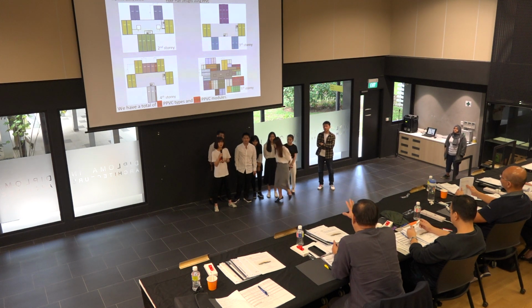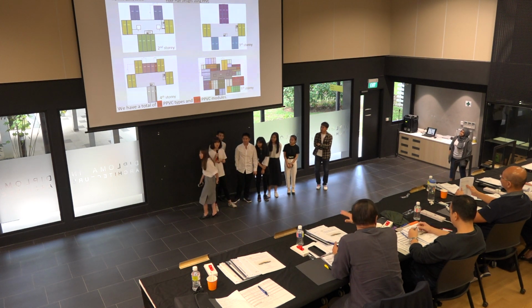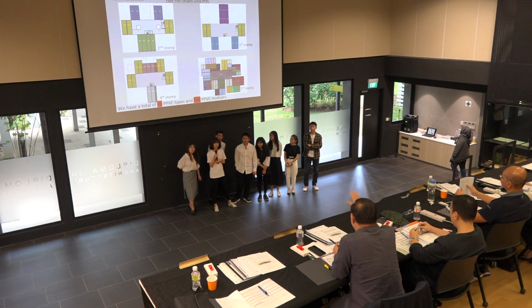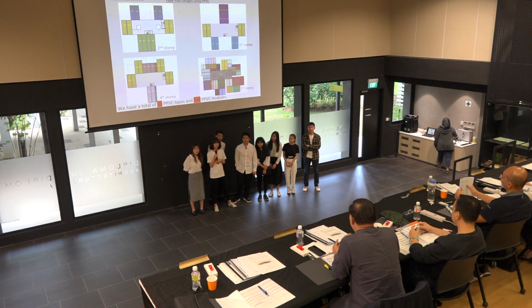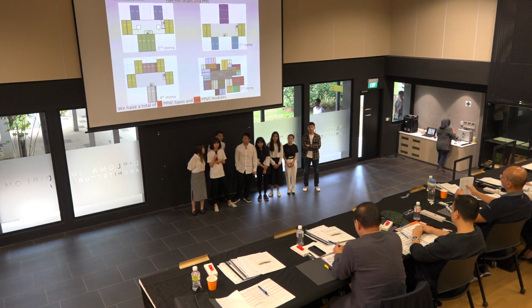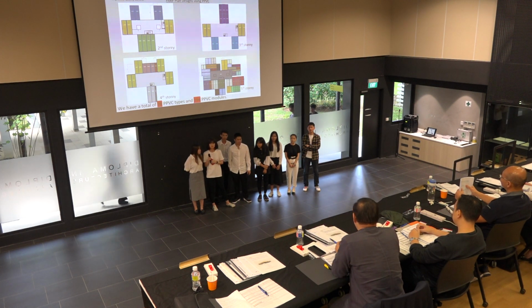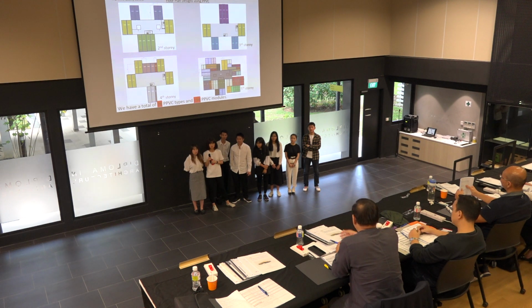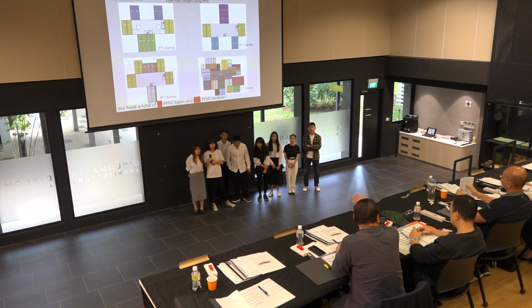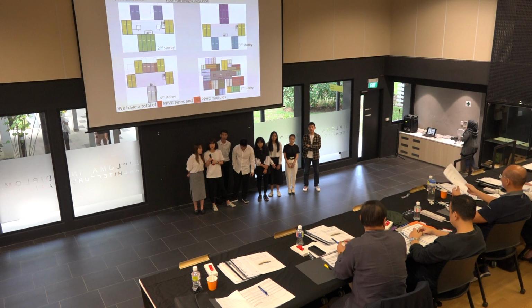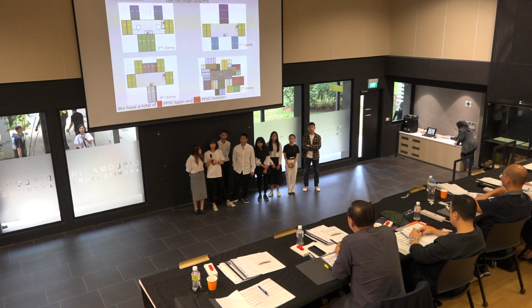Okay, the market average now is about a 6 to 10% premium. PVC is more expensive. If you do an apples-to-apples comparison of construction costs, you might have some savings from shortening the construction period, finance costs, and so on. But if you do a comparison like what you did, PVC actually costs more.